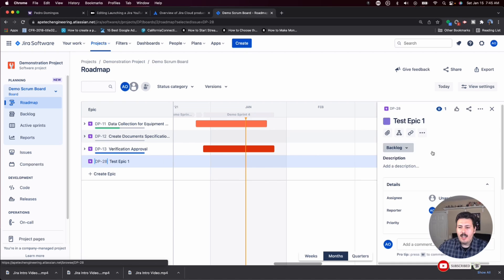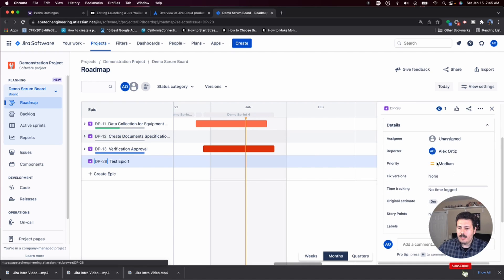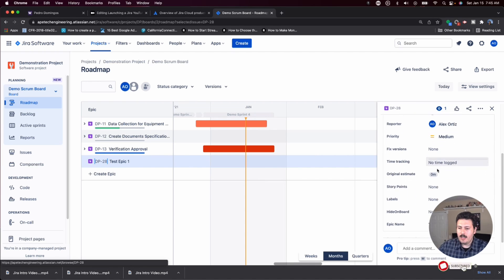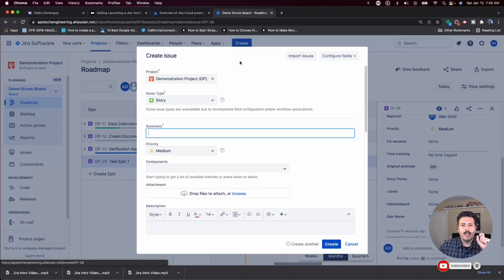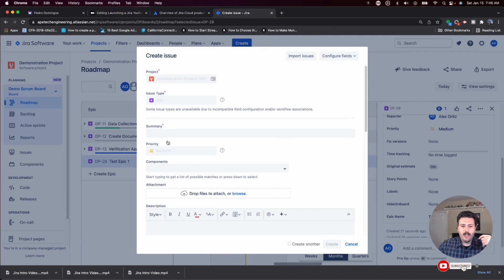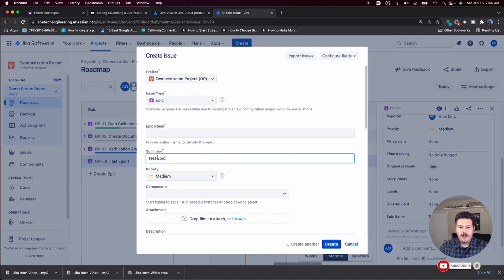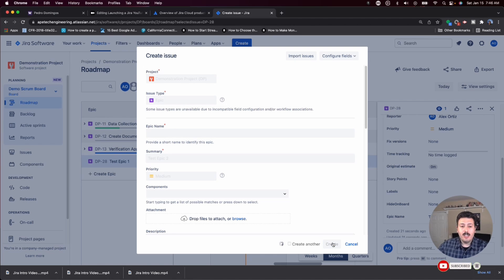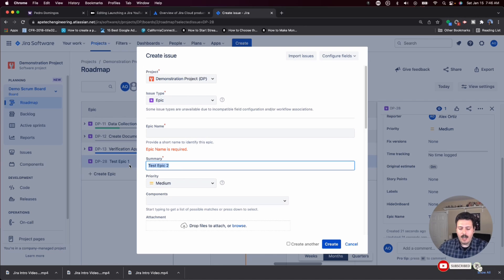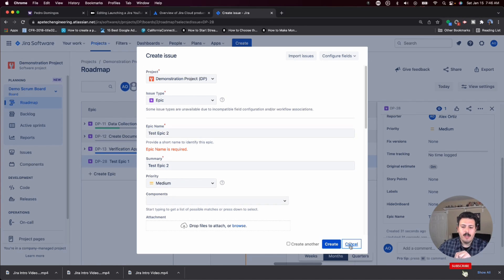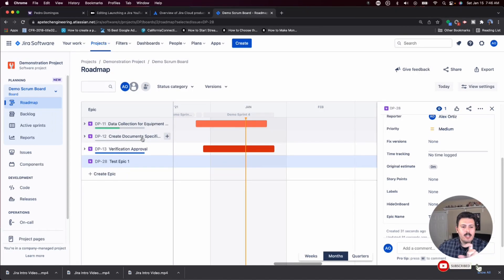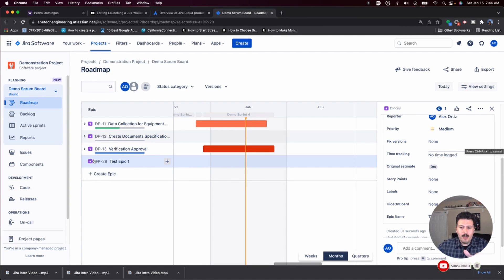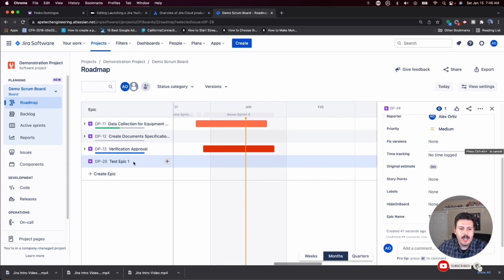What is interesting is the summary is filled out and I'm curious to see what they put under the epic name. Yeah, this is interesting too, because if you hit the create button and you're filling out an epic and you just give it the summary and I hit create, it actually won't work because epic name is required. So I have to come in here, copy it or do whatever I want and actually provide two input fields versus when I'm in this roadmap view, Jira's automatically taking that summary and appending it to your epic name. I think that's a little bit of a shortcut.